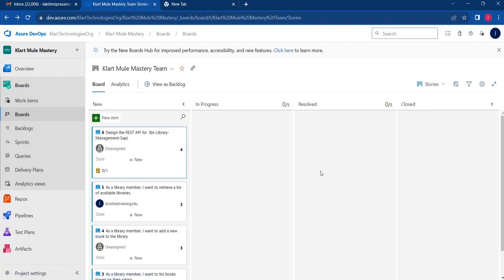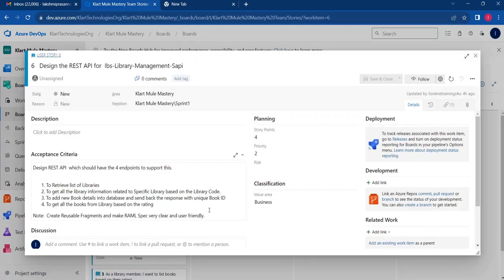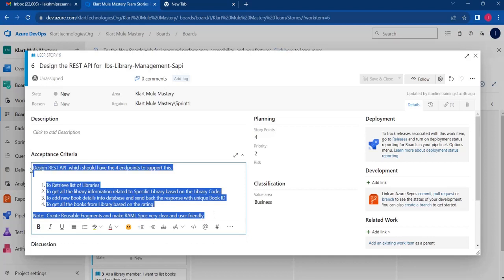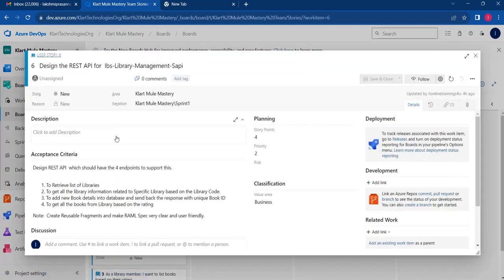So once you are assigned to a project, you need to see which sprint you are currently in and how many user stories there are. They have created 4 user stories, for example. So they will have the user story title and these acceptance criteria. Initially in the sprint planning, everyone will be there in the call, like the scrum master, the development team, the testing team, sometimes the product owner, to discuss the effort we are going to spend, or the story points for this task.